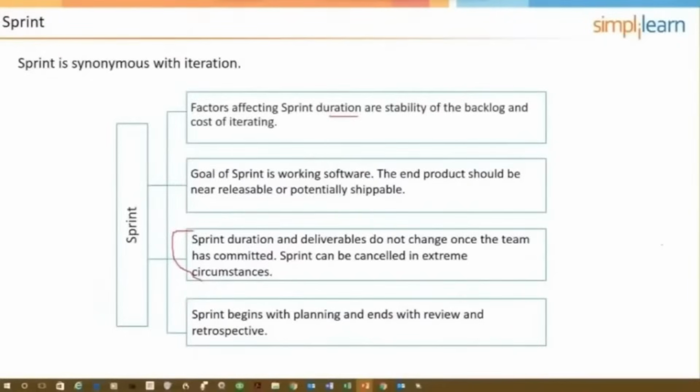So the agenda for the retrospective is what went well, what did not go well, what are we going to do different? And the mandatory participants for that meeting are the team, the Scrum team. Is the Scrum Master going to be there? Likely as a facilitator. Is the product owner going to be there? Maybe, maybe not. If the product owner is there, the product owner could maybe answer questions and help clarify. But the product owner does not weigh in on what went well, what did not go well, and what are we going to do differently. That is all owned by the team.